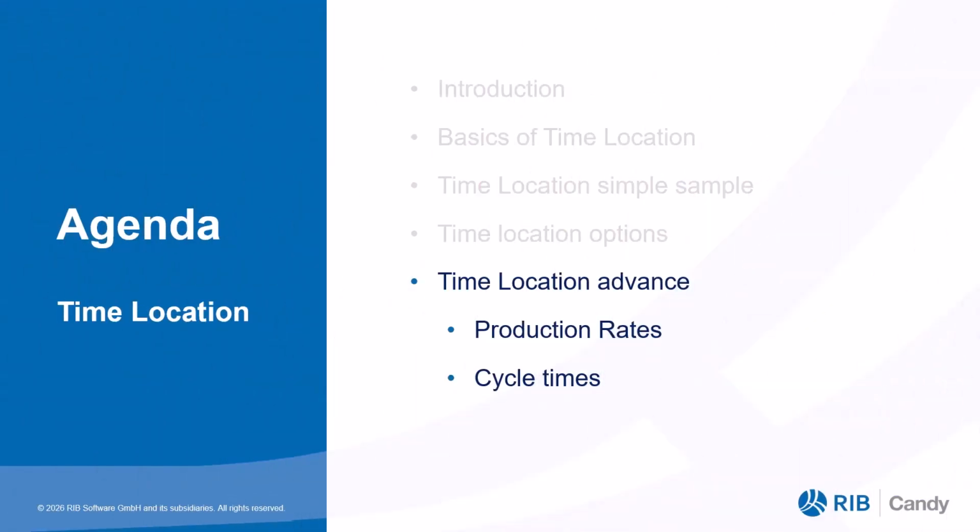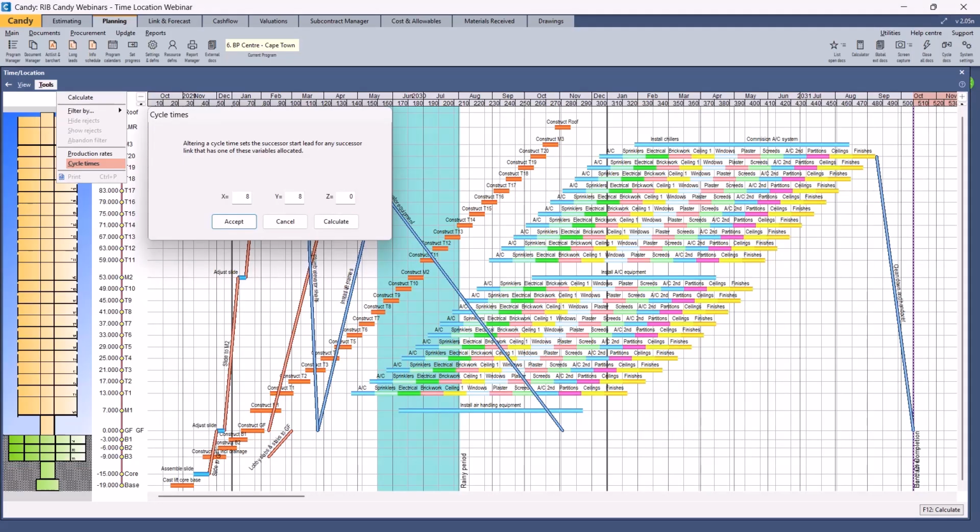Now let us look at the cycle times menu. In a high-rise construction, the cycle time refers to the duration required to have sufficient construction done. That includes formwork, setup, reinforcing, concrete pouring, etc. on a floor before commencing similar work on the next floor.